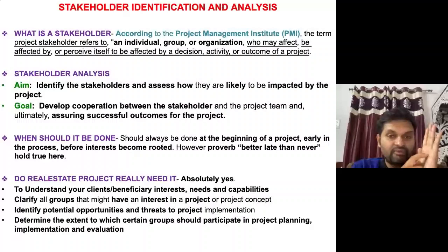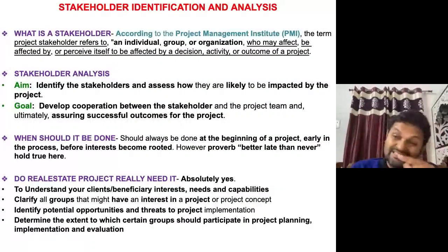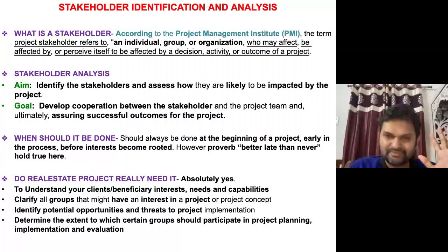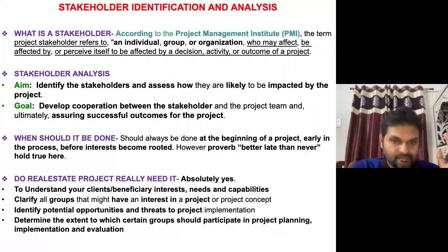On the basis of that, your attendance is recorded. Out of 30 days, if you were present for 15 days, whatever salary has been allocated to you, you get 50%. So Tata did this so that the stakeholders are identified and managed. Are you able to see the example? Simply by giving the salary, if local people are with them, even if a politician wants to influence them, he will not be able to influence them that easily. I hope everyone understood with the example.